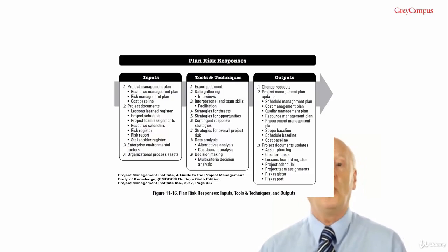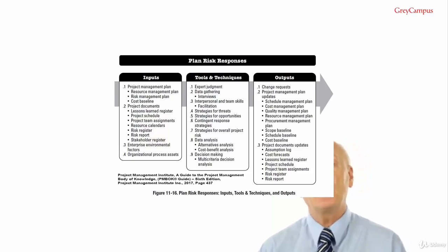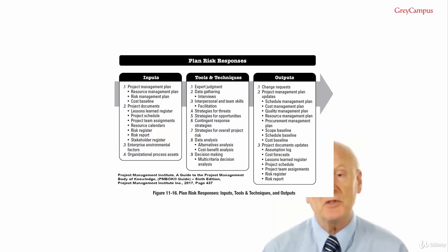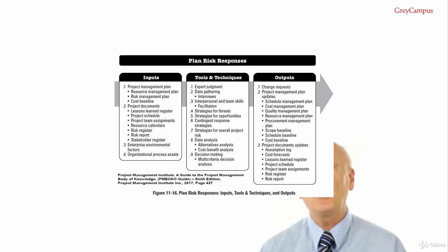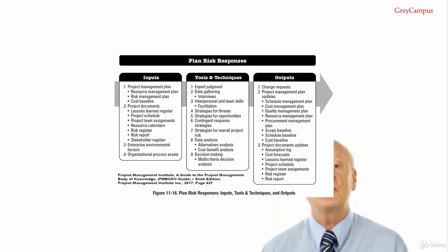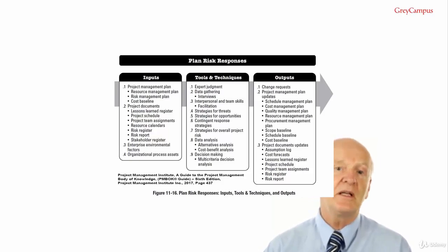Both of these are wrong because the organisation is responsible for the work of all of its employees, and so they would still own these risks. They own the risks of the other team or the other department you're transferring to, and if you employ an expert, they would own the risks of the expert. Risk transference usually involves payment of a risk premium to the party taking on the threat.